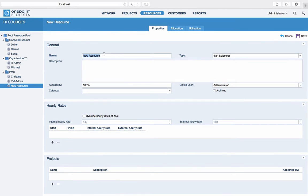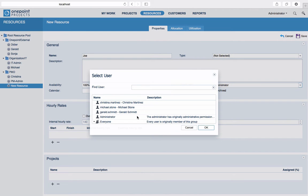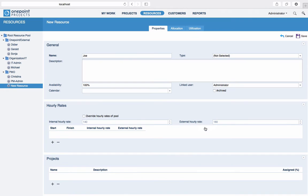There are only a few fields that are mandatory, as always indicated via boldface field titles. You have to provide a unique name and an availability, which is by default 100%. In order for assigned activities to show up in a user's activity list, you will also want to link the new resource to a user. The description field is often used to provide the full name if a short name is used for the resource name.